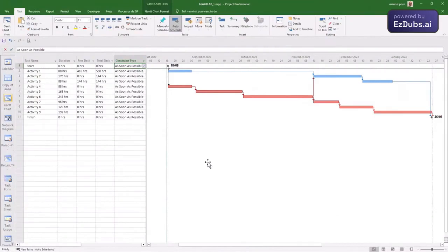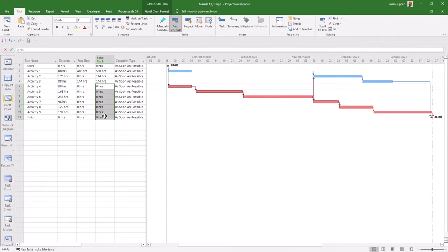Here you see a planning that contains 9 activities, 3 of which are in one branch and 6 are in the other branch. The second branch has the sequencing colored in red, because we adjusted the tool for that, since a total slack of 0 has meaning. A total slack of 0 shows that no activity in this branch can be rescheduled, or, in the future in execution, be delayed without impacting the end of the project. It defines the longest path of all branches and also the fastest way to do this.